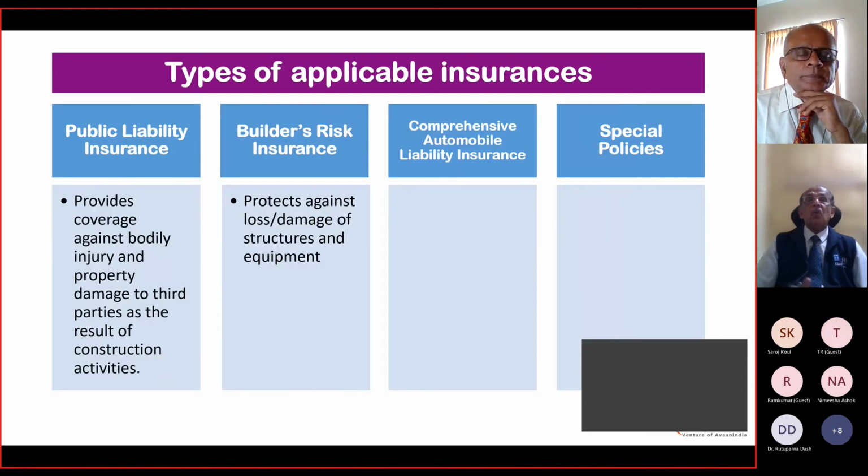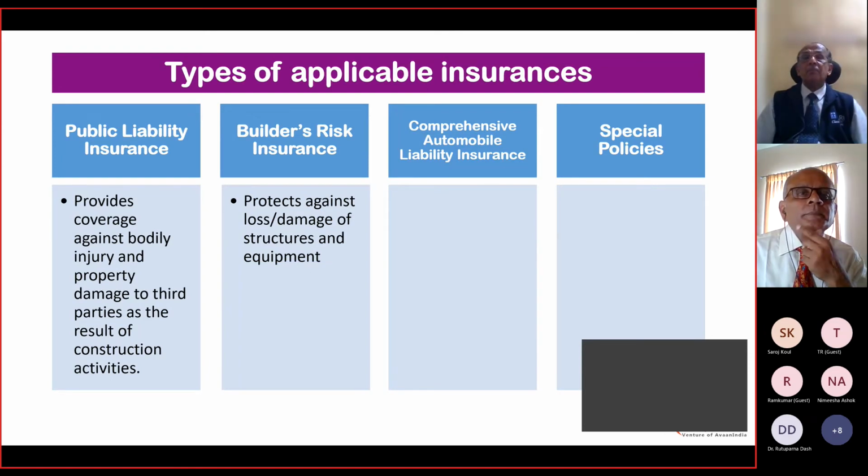Thank you. Right. Now look at the type of insurance. Why should we take insurance? Let me add a little explanation on the insurance part. In a project scenario, there are two types of insurance. There are materials being shipped from a foreign country or transported within the country. There are quite a number of cargo movements, and these materials have to be insured on a door-to-door basis covering all risk. That's called cargo transit insurance.